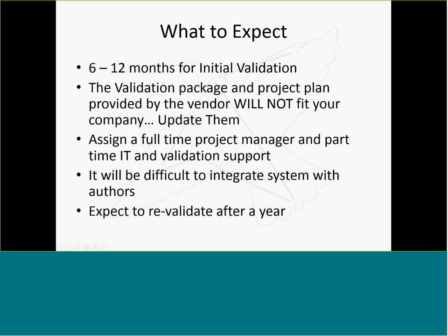This project will require a full-time project manager. Again, 6 to 12 months, a big difference is the project manager you assign. Your project manager needs to have some sort of experience with dealing with the system you selected, and if not, with publishing or in regulatory systems in general.